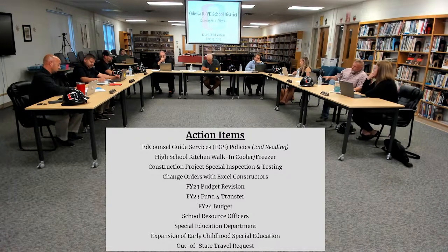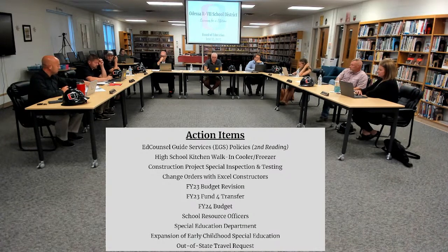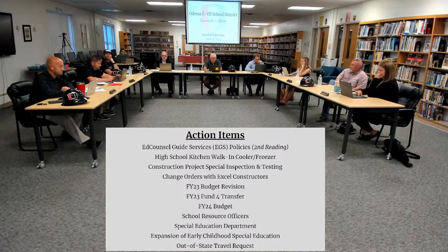Okay, next we have construction project special inspection and testing. Included in the packet was a proposal from Kruger Technologies Incorporated. This is a group that does special testing on construction sites, whether it be the strength of the concrete, the mixture of the concrete, asphalt, testing the soils that we've discussed in middle school.